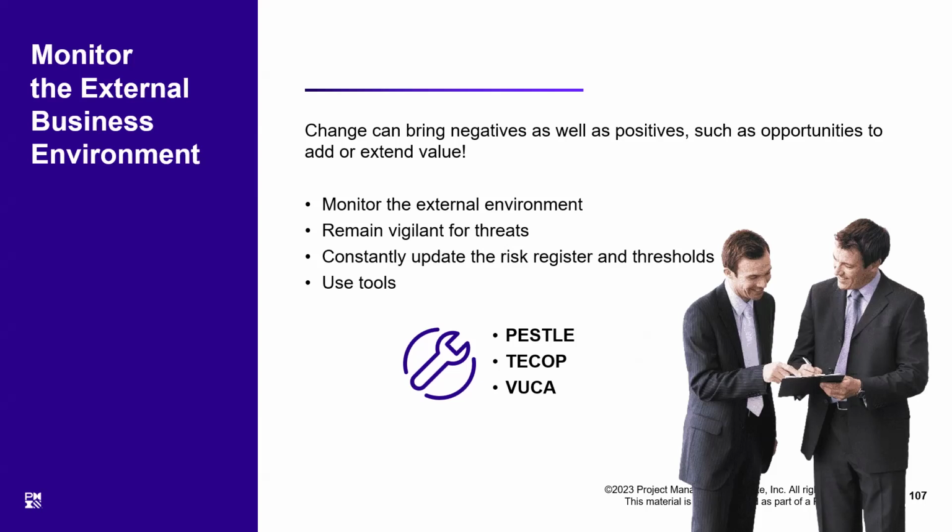And if there is any change in the business case, this matter has to be reported to the project board through a change request. So therefore, we can follow the proper change control mechanism, and we can even change according to the business environment.